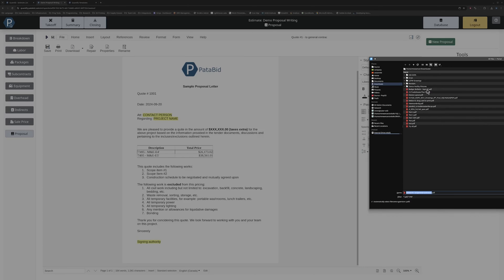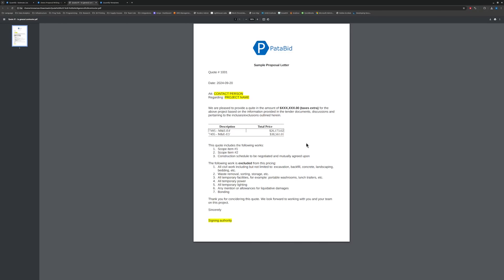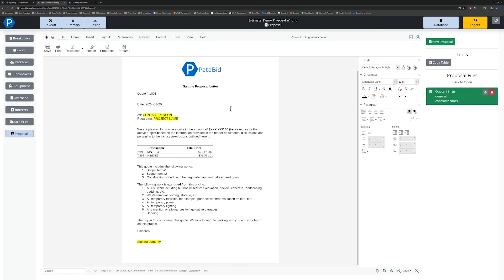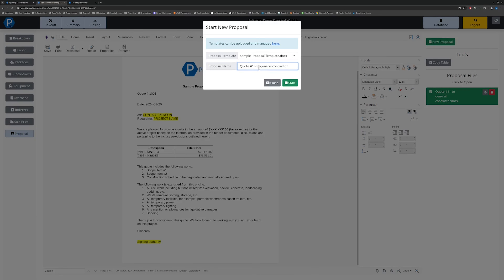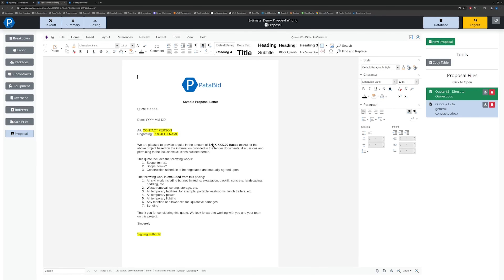So if I download this now and open it up — here is my proposal, ready to send out to my clients with my pricing and all of the details that I might need. And you can create multiple proposal documents. So if you're bidding separate scopes of work to separate general contractors or different owner groups, you can simply create another proposal here — for example, directed to owner — and open that up as a new proposal to adjust your scope and manage all of those pieces.